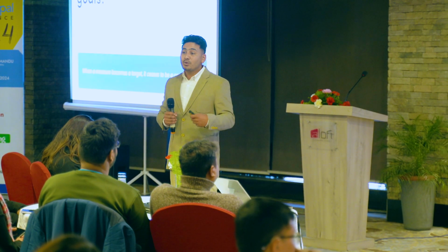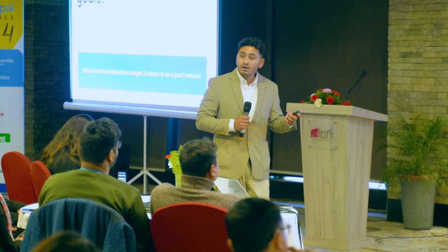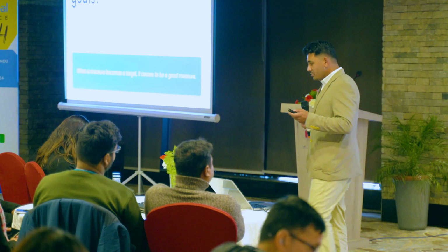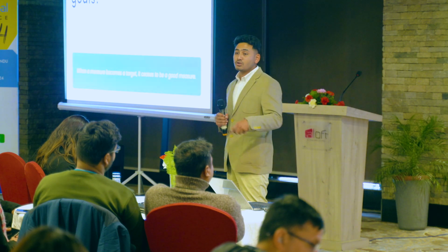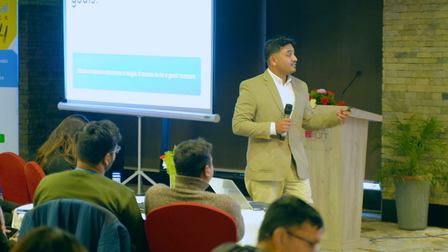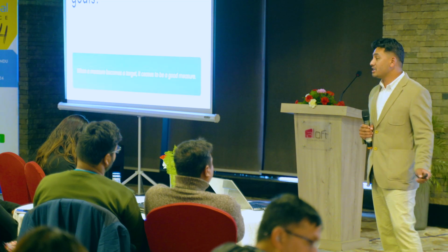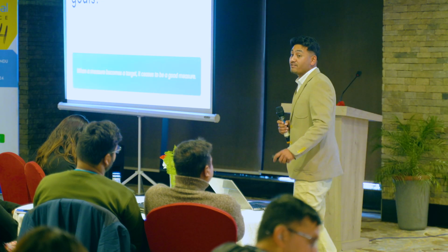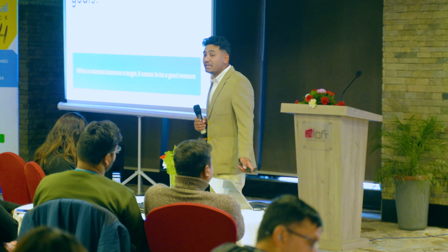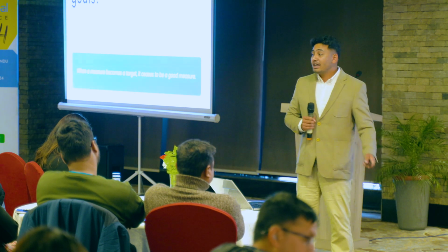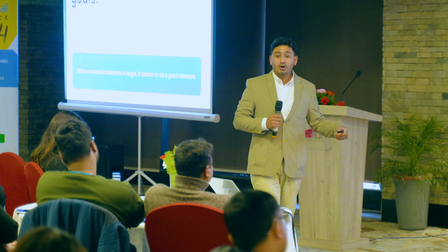Value means, are we helping the customers achieve what they are on the platform for? So the business revenue, those users, right? That's the value I'm talking about. Looking at the sprint burn down and the velocity chart, what it gives us is the amount of work we have completed, the amount of work that's remaining, and how much time it takes to complete those product backlog items. But it does not really tell us that we're actually generating revenue or profitability, or that we are actually helping the users achieve their goals, right?